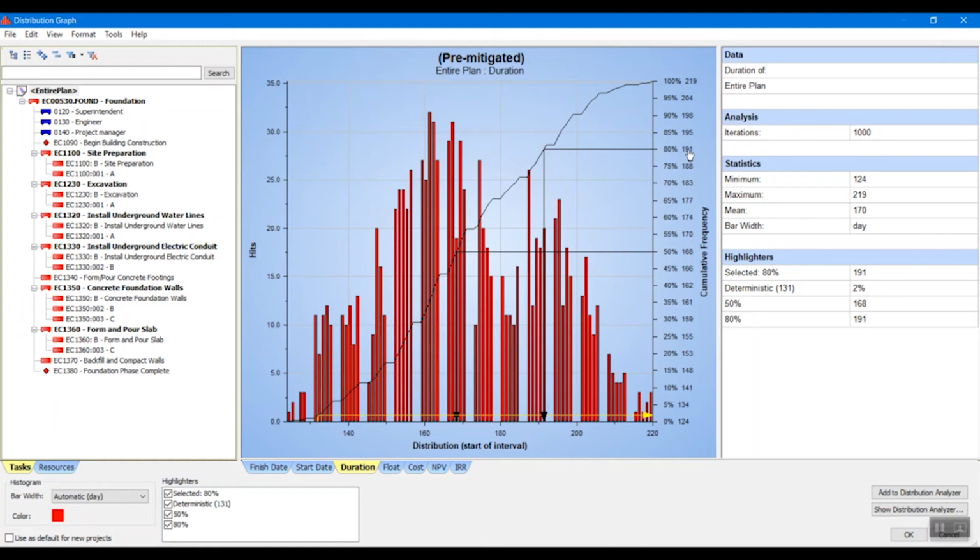So that tells me that the impact of risk A is 205 days minus 201, which is 4 days. The impact of risk B, same value, 205 minus 201 is 4 days. The impact of risk C is 205 minus 196, which equals 9 days.